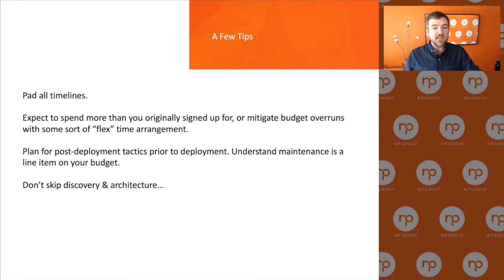A couple of tips I can give you based on everything that I've said and the fact that I've been doing this for a while. When you build an internal schedule, pad it. I mean, absolutely pad it because it's always going to go longer. It's very rare, 1 in 20 projects that goes faster, very rare.